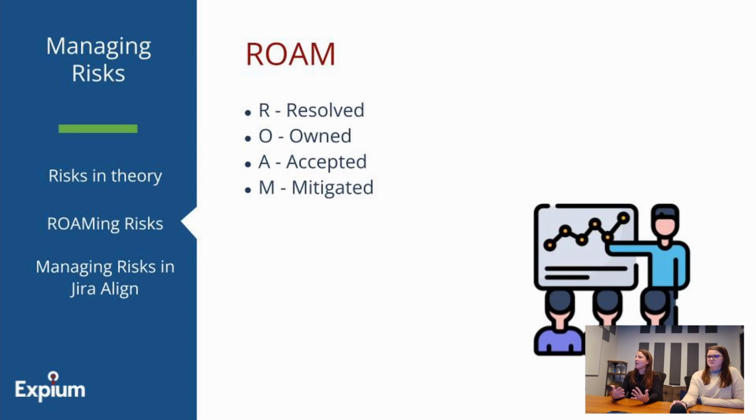So how long it was going to take, or if it was even possible, those weren't known by the team. And so they accepted it. And I got on my soapbox and I said, now guys, come on, what can we do? And ultimately what the team decided to do was to do a research spike in an earlier iteration and then set aside more time at the end to actually work on developing that solution.